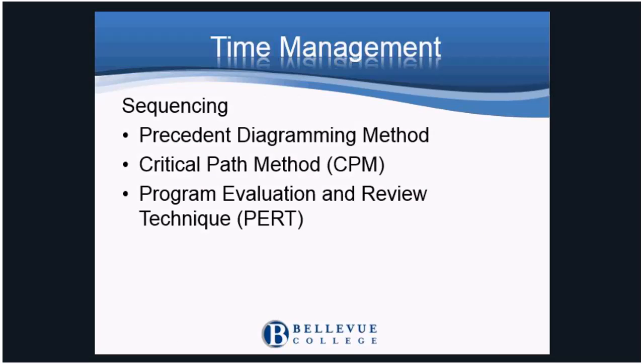Next, the activities need to be sequenced or set in order. There are different approaches, but it is best practice to use precedence diagramming first, then the critical path method or the program evaluation and review technique are performed next. These are actually similar methods with the same steps.